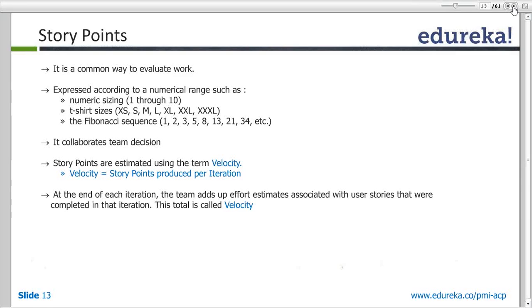Yeah. So in the Fibonacci sequence, you are taking 2, 3, 5 story points. When you say 2 as a story, it means 2 was its value out of the estimation. Yes. But it has nothing to do with the number of features or something, right? No, it's just the complexity. Okay, it's just a complexity value. So 2 was its complexity, 3 was another complexity, and 5 was another complexity, and all 3 were completed, so the sum, the velocity, is 10. Yeah, 10.